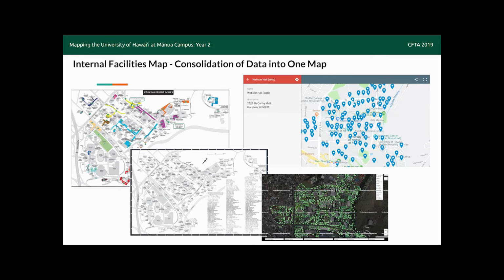The construction data before it goes to OnBase is going to be pulled from eBuilder. So this is going forward from now. Our eBuilder admin person is developing it so there are no exceptions taken, so everything is submitted in its final form without notices on the side. And once the project is closed out, that's when they load it into OnBase and put in all the keywords so that we can link to it from this system.